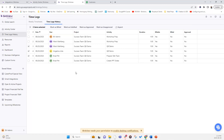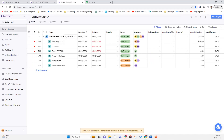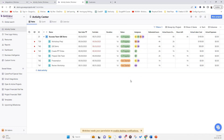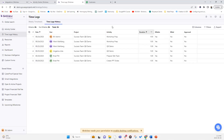A quick note on requirements before exporting time logs to QuickBooks: in the project details you must identify the Customer Name, as this is one of the parameters the system looks for when exporting. The other requirement is to have a resource's hourly rate set. We'll see what happens when a resource has an hourly rate versus one who doesn't — let's click Time Logs History, then Export to QuickBooks.